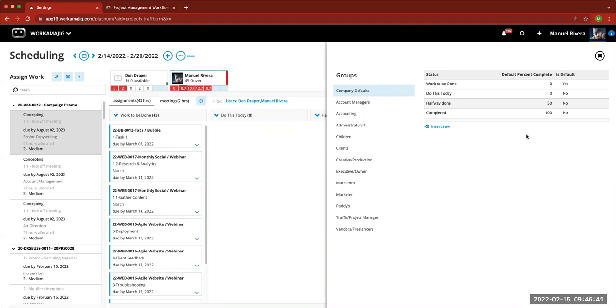You do lose out a lot on that ability. But the alternative is to then set percentages. Hey, I'm a creative and I want to tell someone that in my assignment, even though I'm not entering time, I'm this much done. And so these columns, when you put your assignments underneath them, can be set to a % complete to give that kind of feedback.